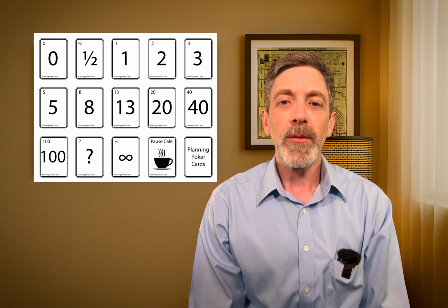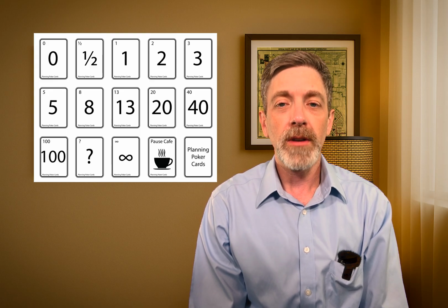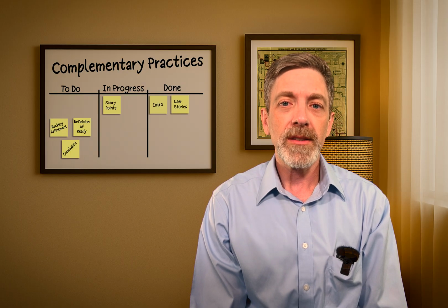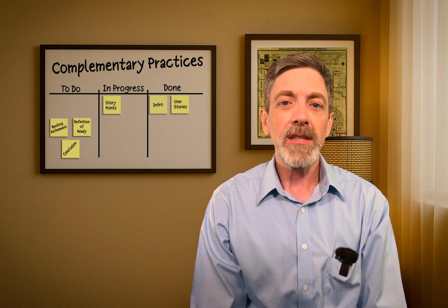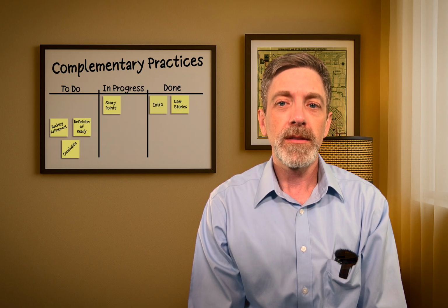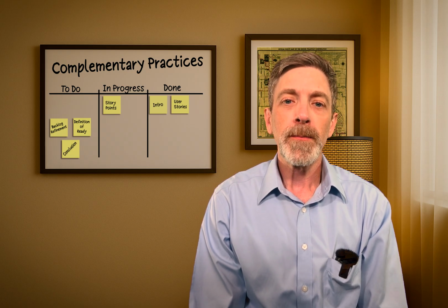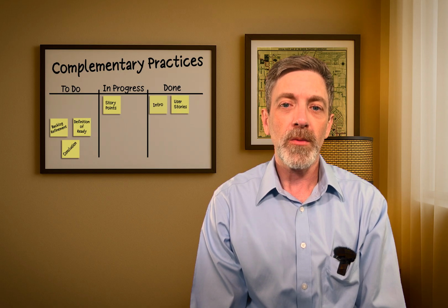Unsurprisingly, story points came out of extreme programming alongside user stories, though not at the same time. For story points, user stories were estimated using time-based estimates, ideal days. How long would a task take to complete? How long would a user story take to complete if you had no interruptions, no meetings, and you were fully focused 40 hours a week?